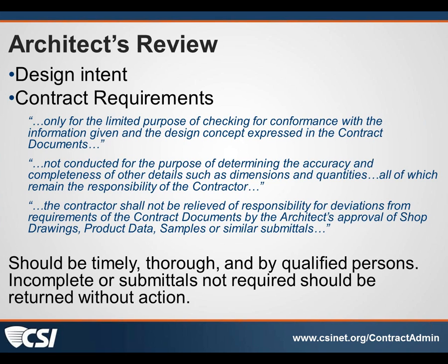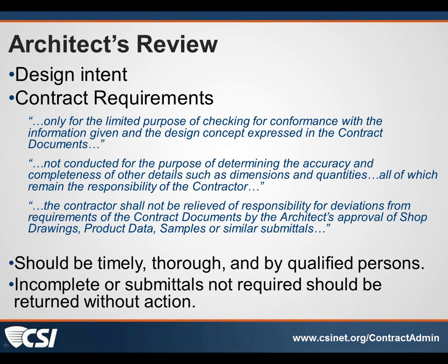If it's not a required submittal, there's no reason that we should be taking action on that submittal. And in fact, if we do, then we're starting a process that might be hard to back out of once it's over. So, as Doug said, if it's not required, ship it back to them. Their process of getting materials to the job and ordered and in place is not a part of our responsibility through the submittal phase.